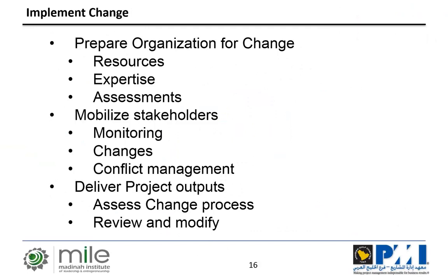Now, the change management team can be as small or as large as is required. But really what you're trying to do is you're trying to have people, resources focus 100% in change. And it is a good practice to actually isolate them a little bit from the project work. So you may want to have those resources work in a very close team, talking to the different teams in the project, not related to change, only when they're really required to do that. Of course, that communication has to be very consistent, but you want to bring up those resources and those expertise just to work for the change.